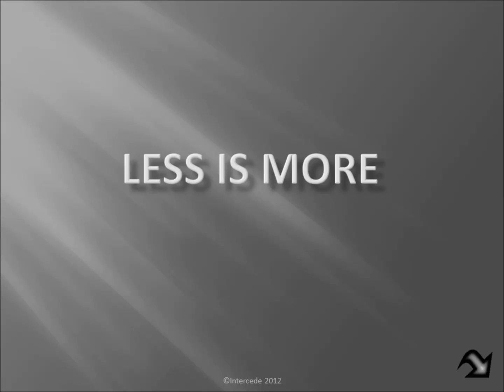These are the watchwords of soft logic. Less is more. And I basically belong to the school of thought that says no schedule should be greater than 3,000 activities. And some of you are now shaking your head, and I think that you can accomplish everything that you have to and more by putting less into the schedule. That doesn't mean you lose any of the detail. It just means that it's not necessarily captured in the schedule.